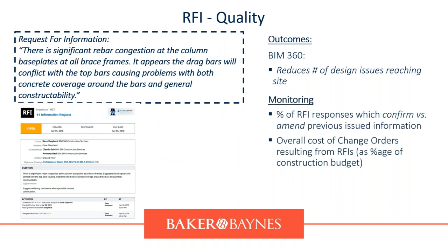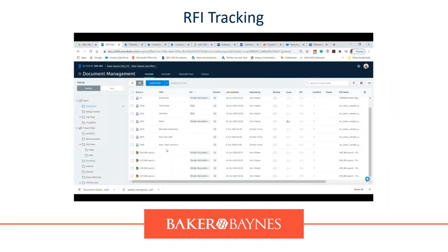The percentage of the RFI responses which confirm or amend previous issues, that type of information can be logged into the system. You can also have a look at your overall cost of change orders resulting from your RFIs, the number of RFIs open by age. So on average, how long does it take someone to respond to a specific RFI? But let me show you what this looks like in the product.